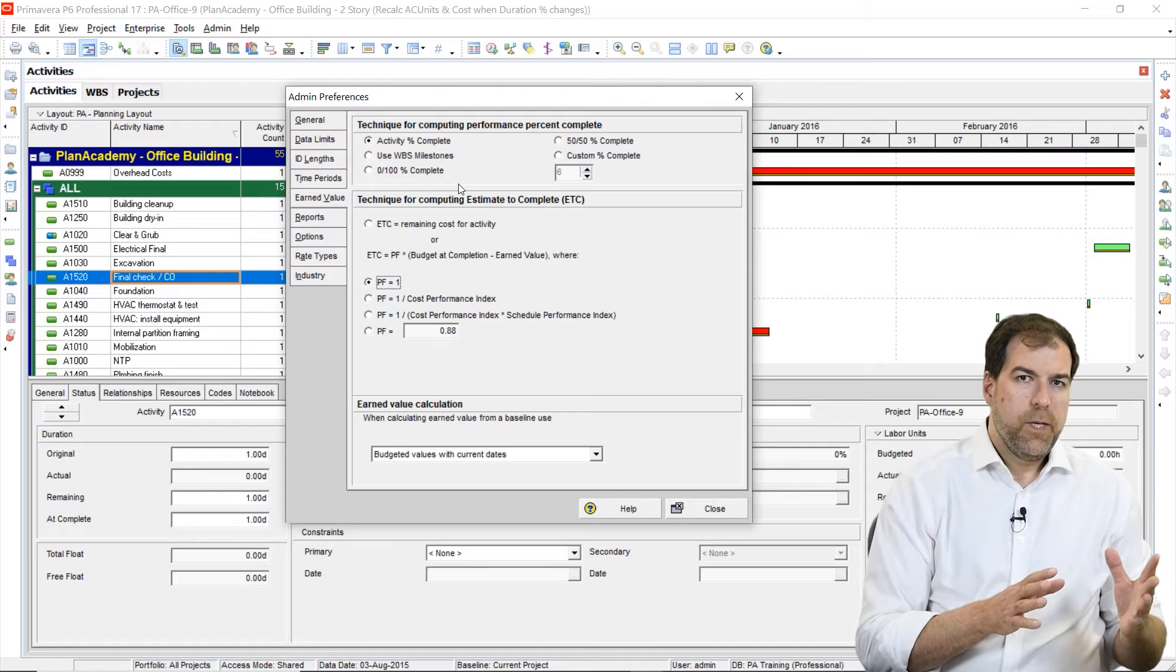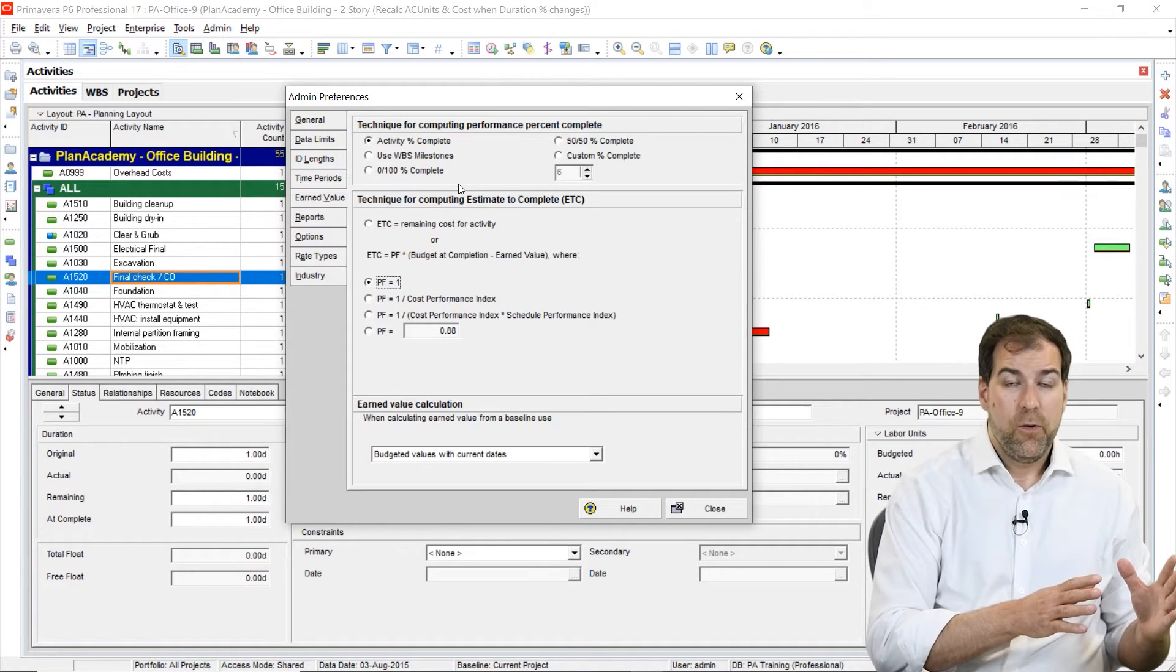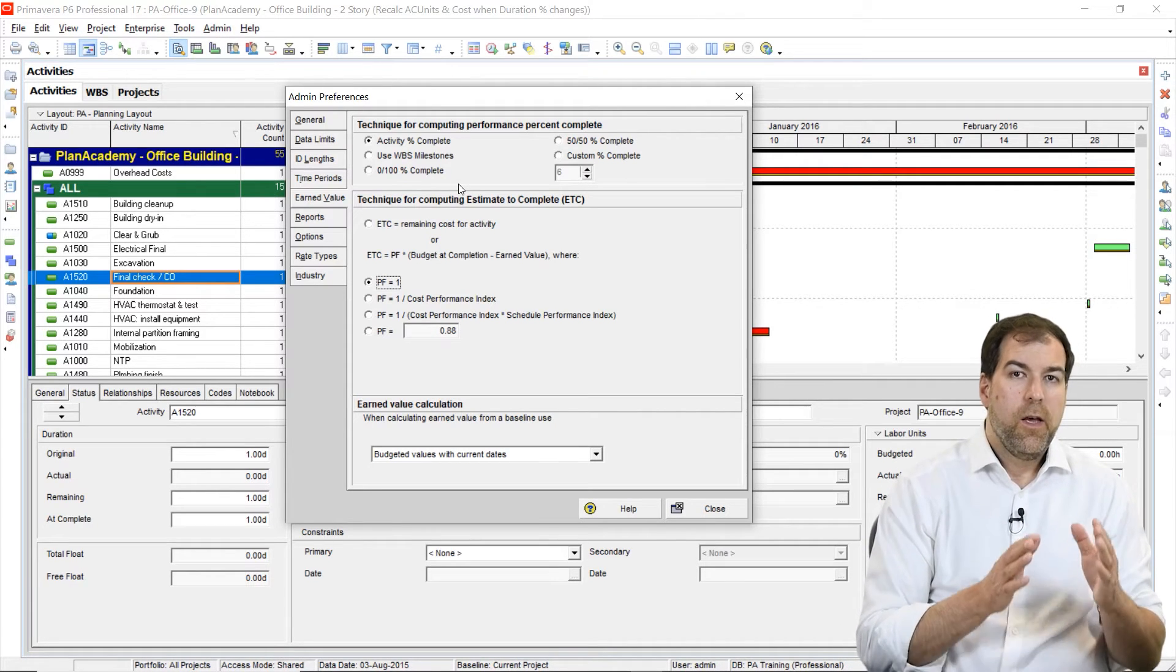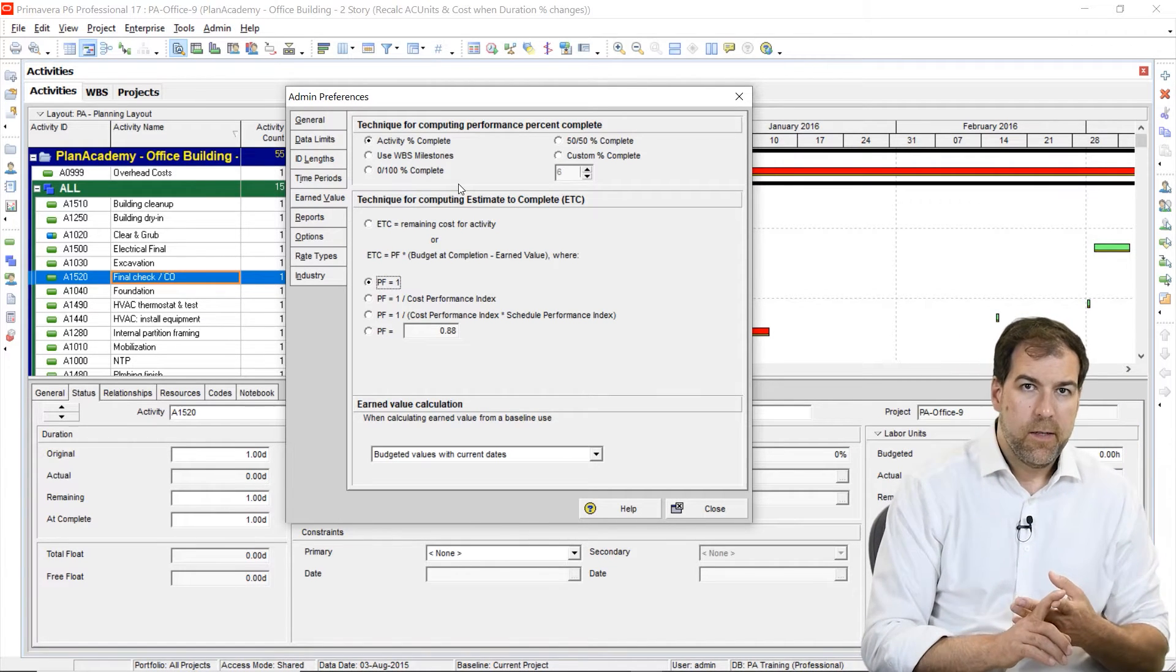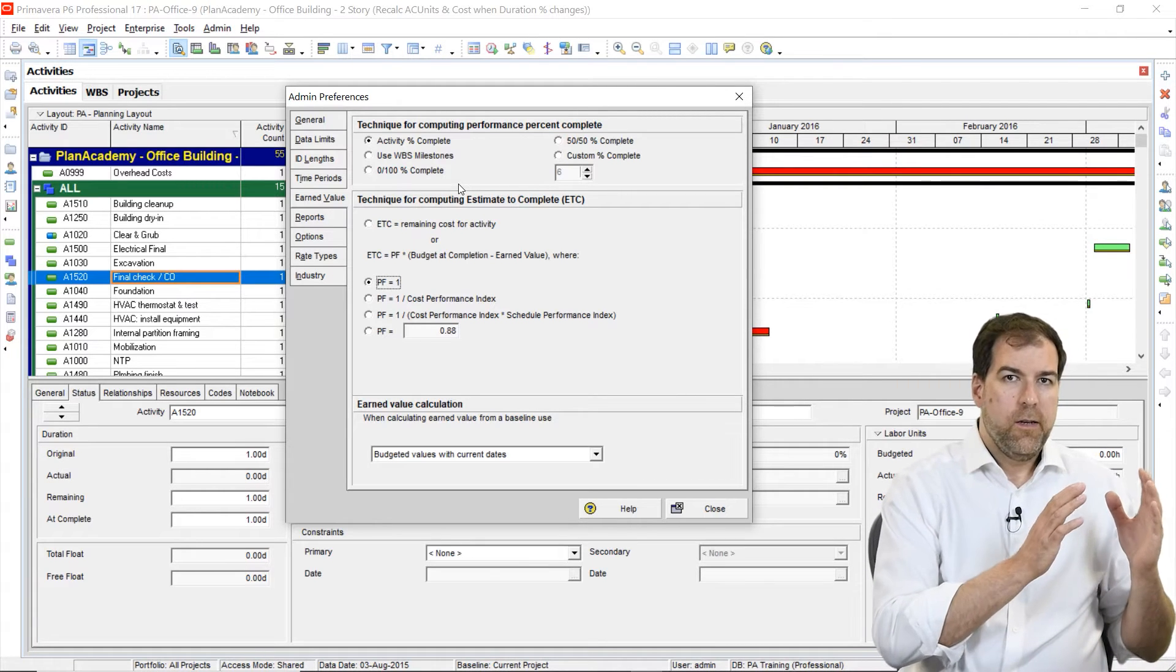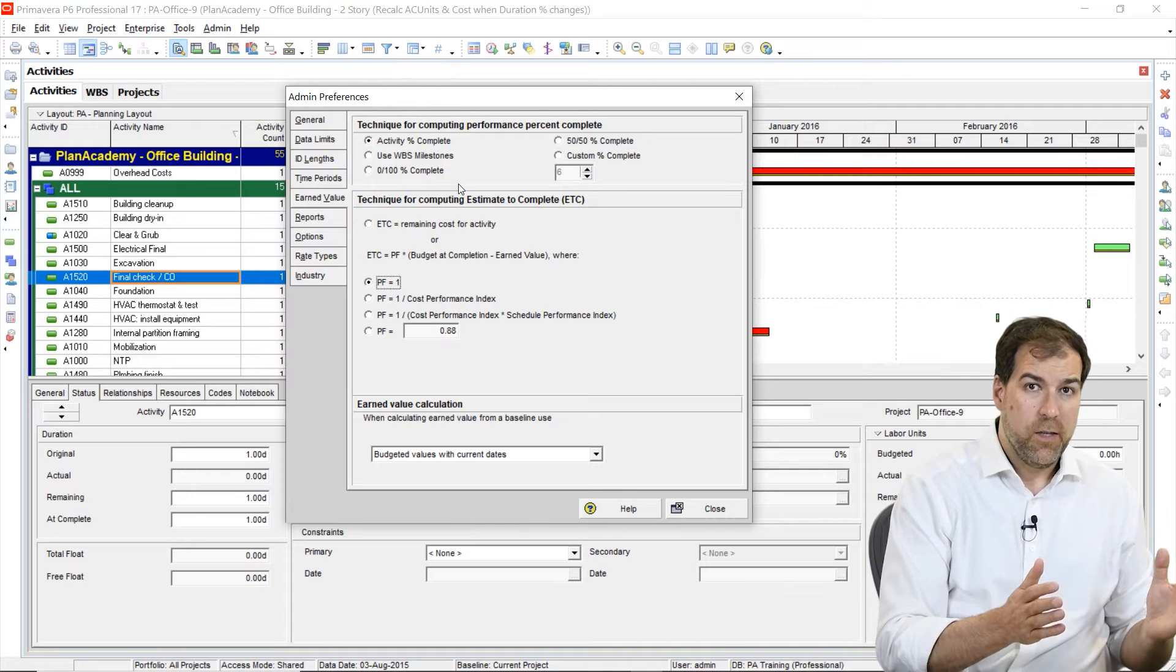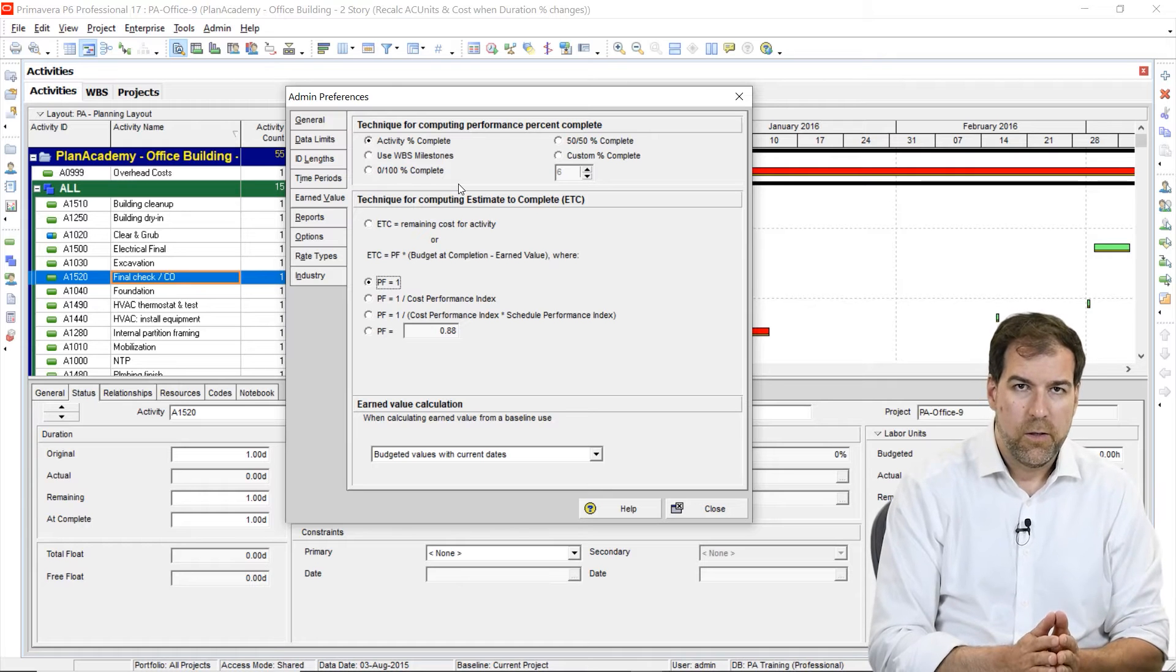Performance percent complete is the main percent complete value or field that we are going to use when we're doing earned value in Primavera P6. Performance percent complete rolls all the way up to the top of the schedule, so we like that. But it also plays a big role in telling us how far the project is or how far the activity is. And that performance percent complete is used in all of the earned value calculations.